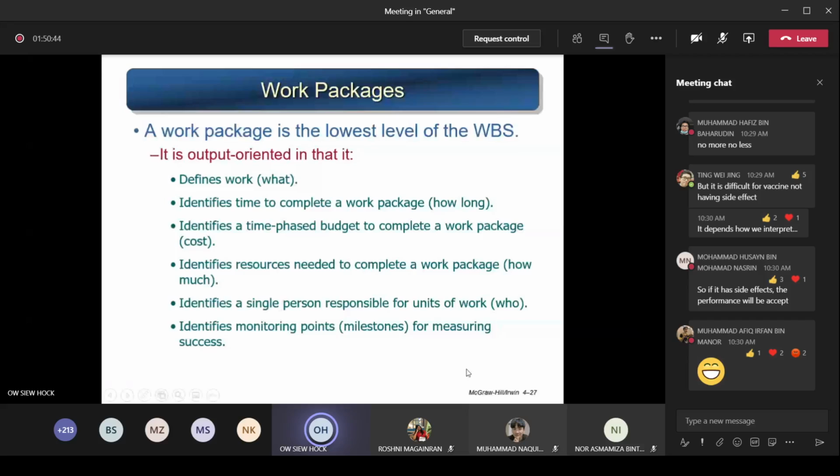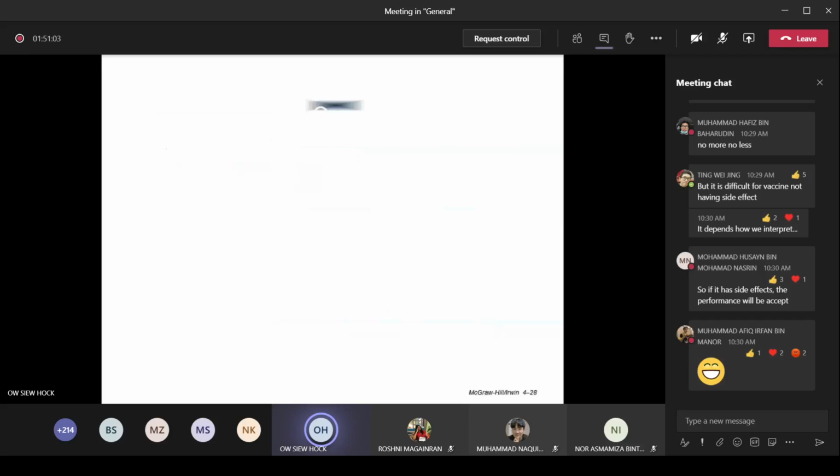So you know, okay, this task, you must finish at a certain point in time. This survey form, I must finish, let's say, one week later, that is the date. Let's say on the 7th of October 2020. So I have the date. By 7th October 2020, I have to finish the survey form. That is the monitoring point. So that is the lowest level. You can define all these things very clearly.